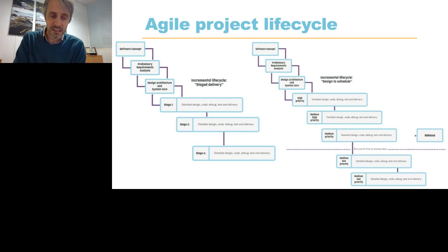Releasing at an early stage, at stage 2 or stage 10 or whatever it might be, is challenging because there might be a big monolithic user requirement document that can't be partially approved or formalized. And if the release cycle takes a long time, then it's difficult at the drop of a hat to decide to do a release.